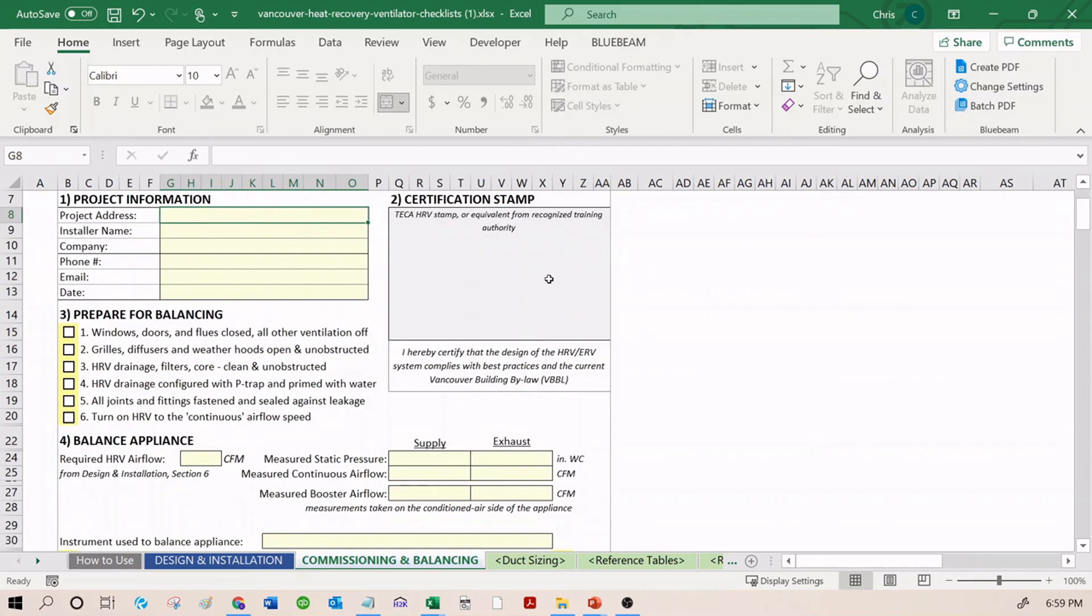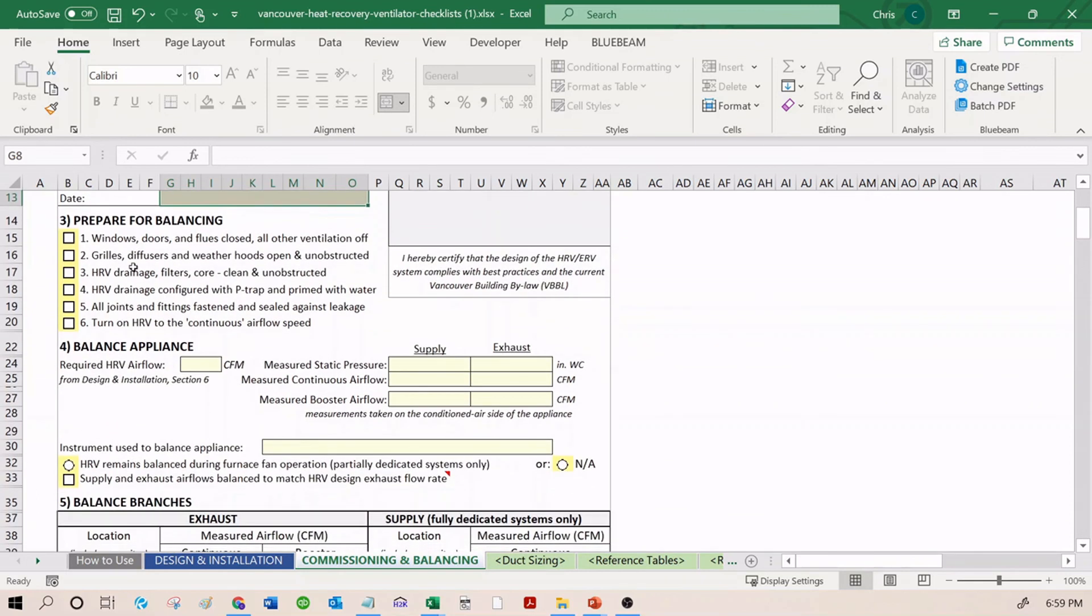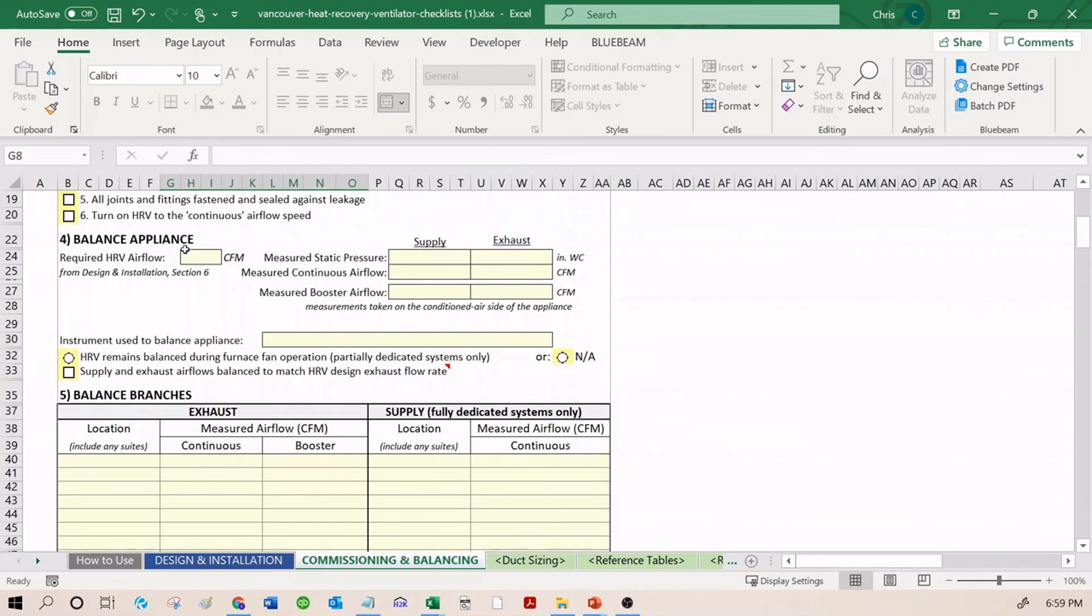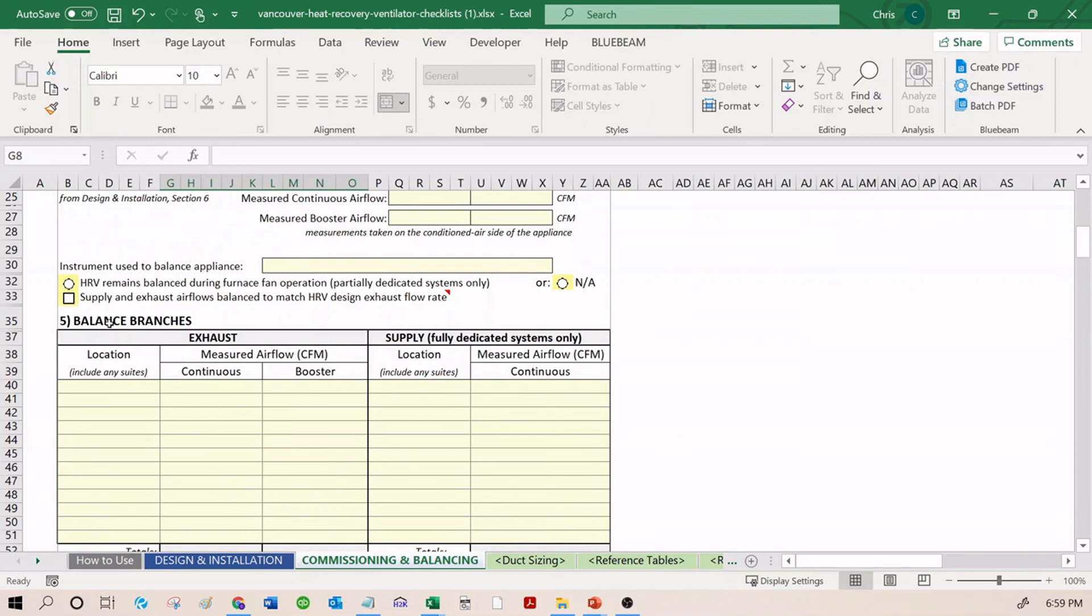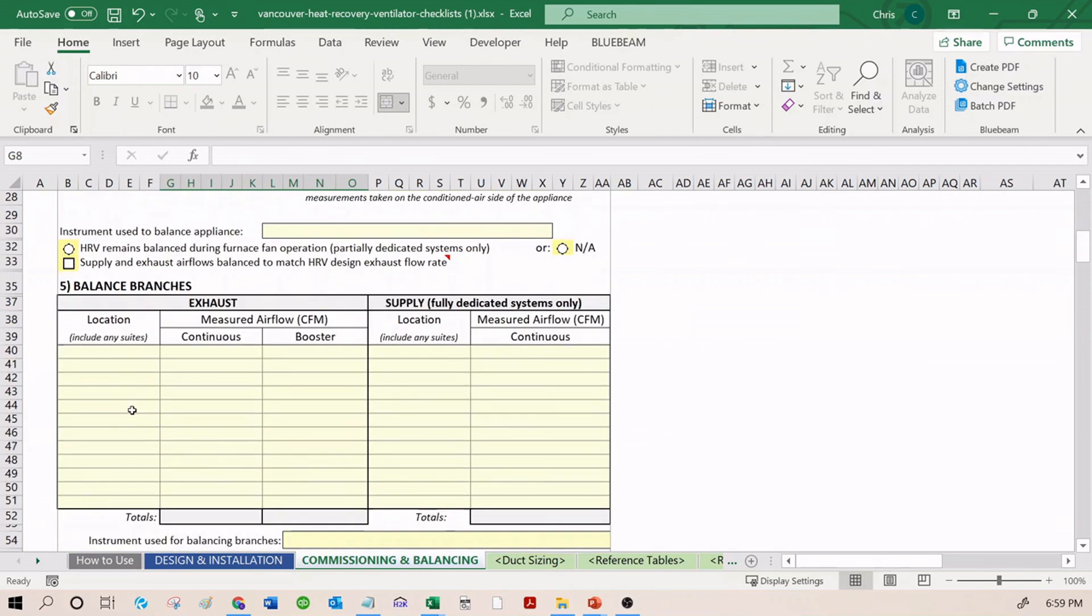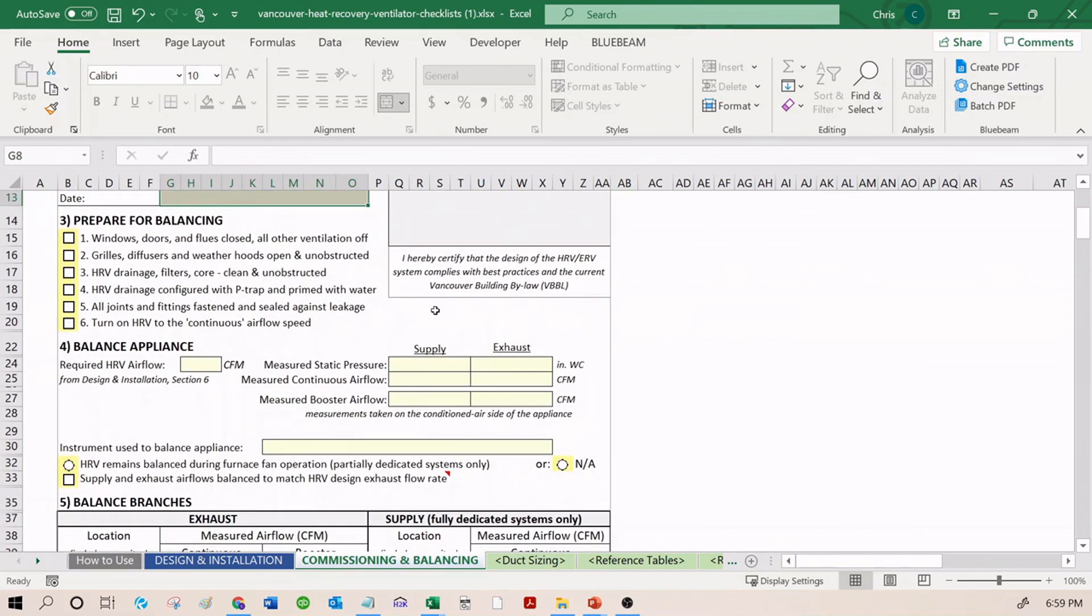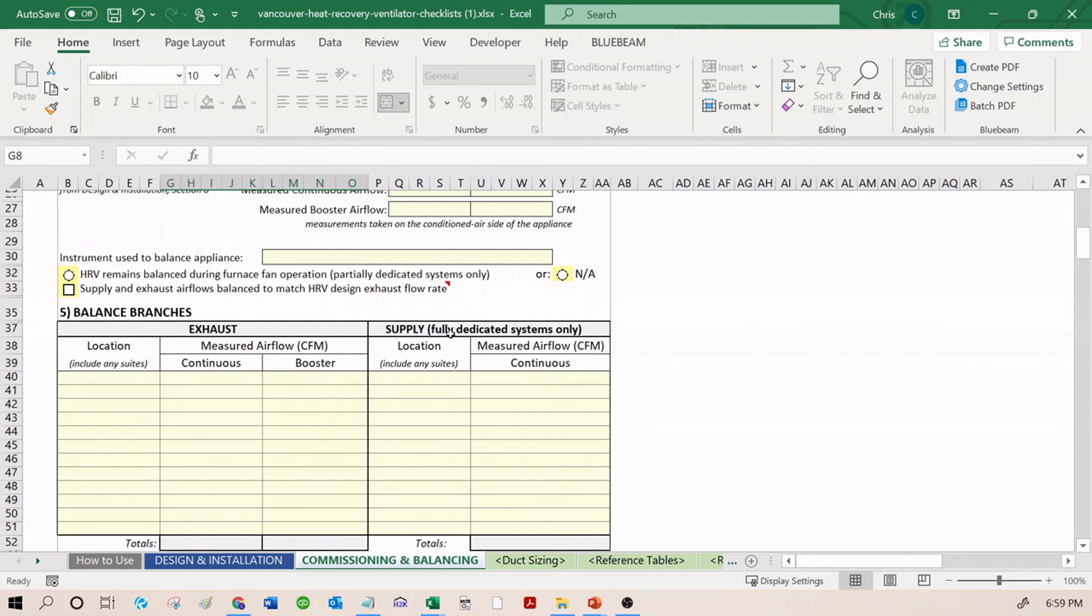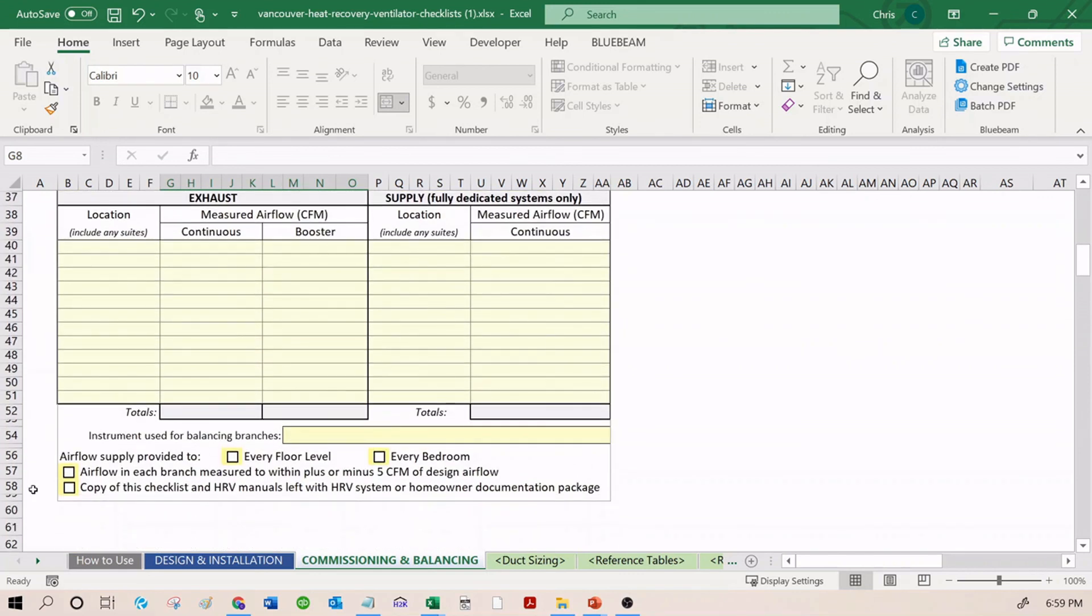Similar to the other checklist, project information should be filled out. The certification stamp should be filled out. Prepare for balancing by confirming all of these steps. This is how you prepare the building. Balance the appliance first and balance the branches second. Again, this checklist is very similar to the TECA checklist. So once you've taken the course, you should be quite comfortable with filling it out. Lastly, we confirm again some of the main bullet points of all this.